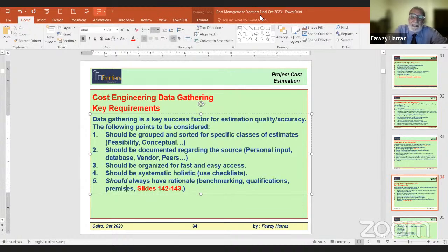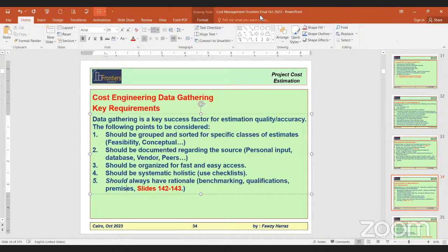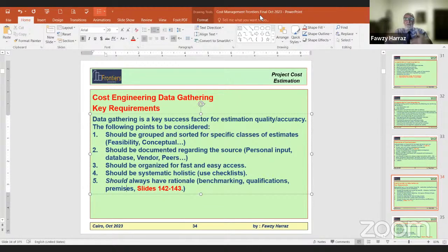In principle, you as the owner, for your business benefit, should not award a losing bid as long as you know it's losing. It was not a matter of accuracy. If it was 550 and I offered 500, marginal. But if his estimate is something like 650 compared to 500, this is almost 30%, so it's a big range. Exxon management principles do not accept to award a losing job, maybe for what we call ethics, or maybe to avoid failure.